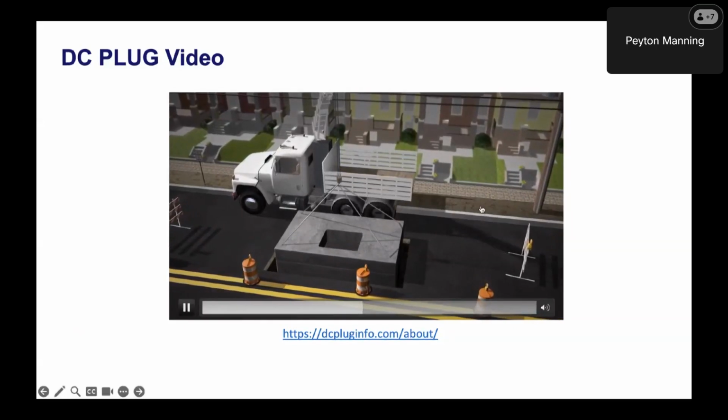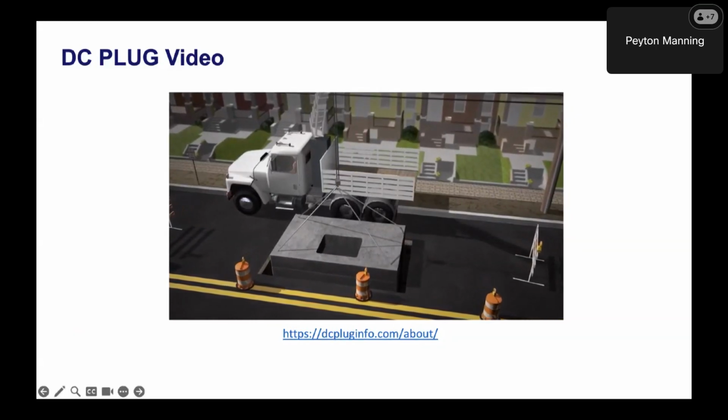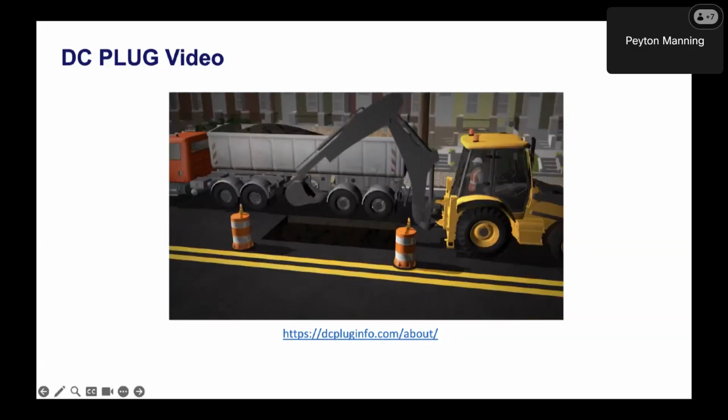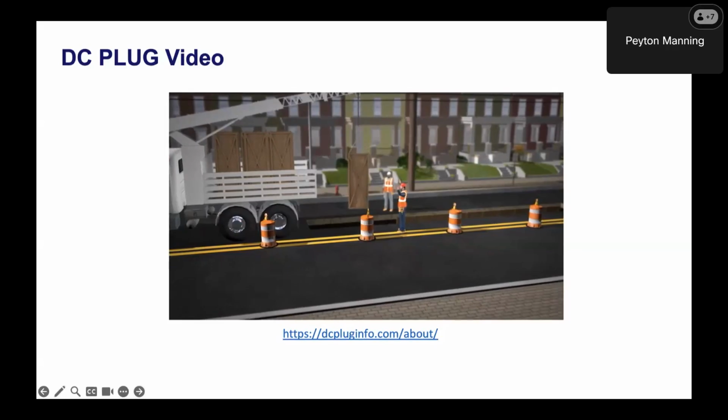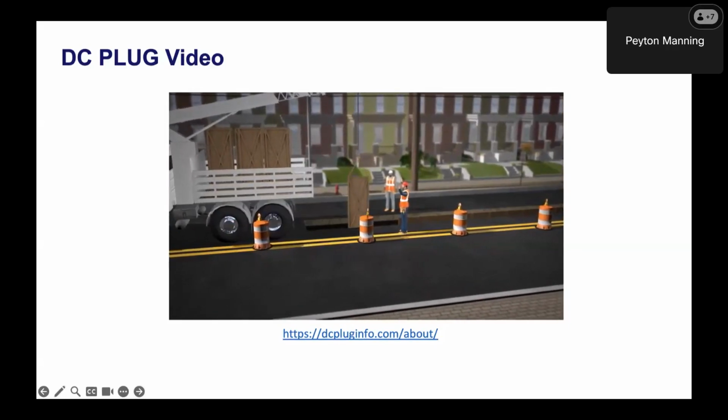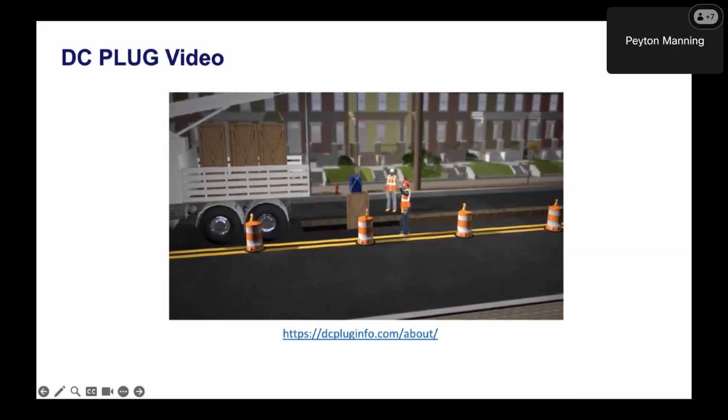to house equipment and to provide access for inspections and repairs. The backhoe will also be utilized in these cases to excavate for these structures. In order to meet jurisdictional safety requirements, shoring will be provided in the trench to ensure stability.